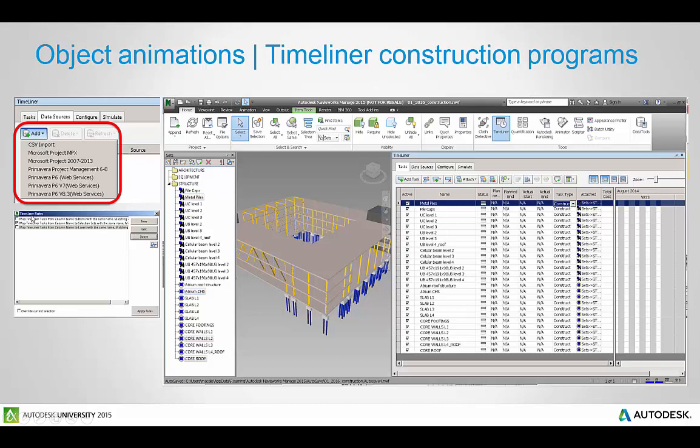I'm going to show you how to click on some of the rules here and then apply these rules to attach the construction program naming to the selection sets inside of Navisworks. So the core thing to note here is you need to get the naming exactly right.